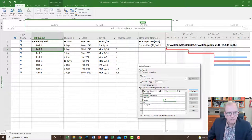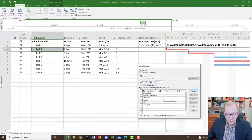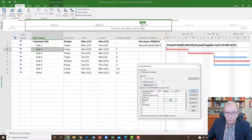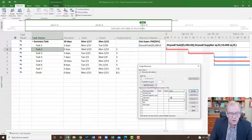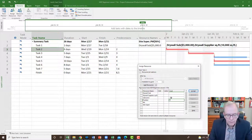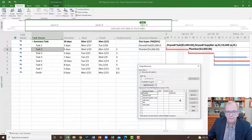For the plumber — they're set as a cost type, so I can't put a unit number in; the program only lets me enter a cost. That's because we made plumber a cost resource. So I'll say $4,000 when they finish task two, and assign it. You continue on like this, assigning different resources to different tasks.